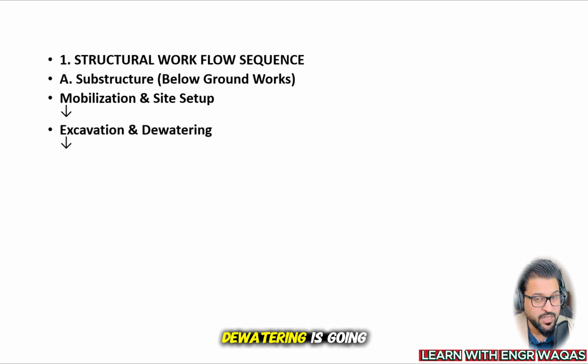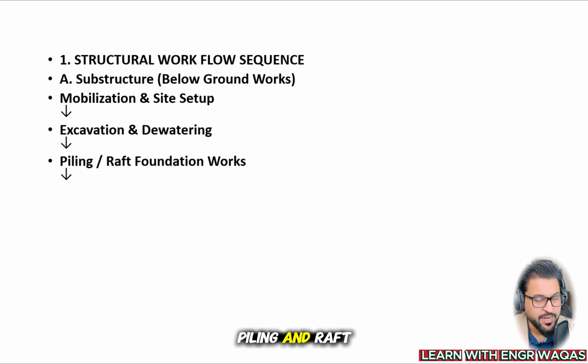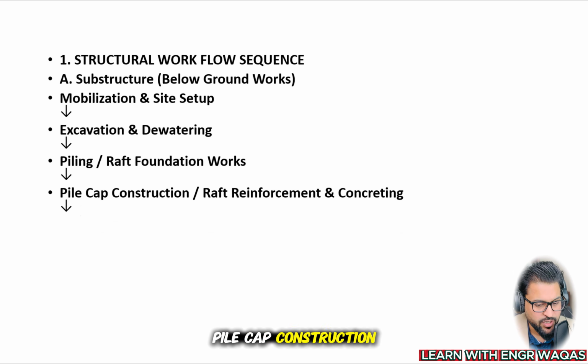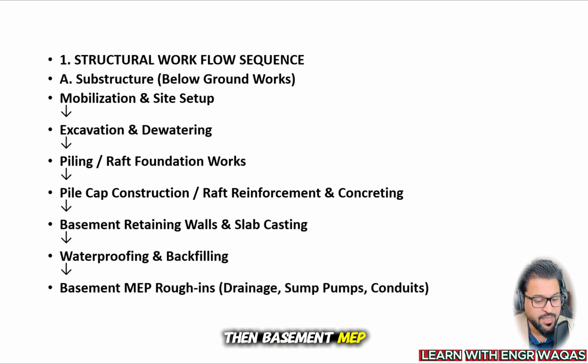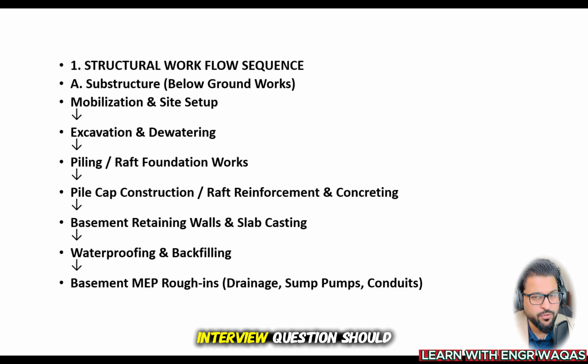Then excavation and dewatering is going to drive piling and raft foundation works, pile cap construction and raft reinforcement, then basement retaining walls, then waterproofing, and then basement MEP rough-ins, drainage, sumps, and conduits, which I strongly believe we have gone through in this project schedule randomly, like MEP rough-ins, drainage, sumps, backfilling, dewatering, and so on. So that flow chart, just memorize it and try to learn how this job interview question should be answered in the shape of a flow chart. So that is the first question which is frequently asked.